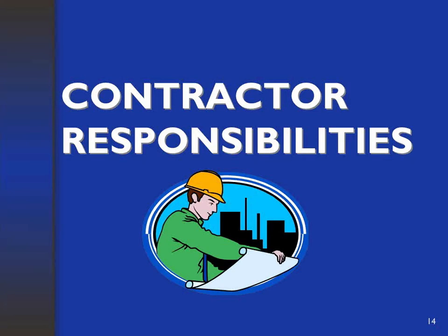find that his or her information reconciles with your certified payroll report, there's really no sense in going back to that sub 6 months down the road, where you've already found a good match and it seems as though you have a good level of assurance that this information coming from both ends is reconcilable. Did I answer your question?